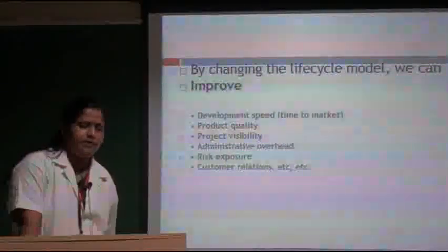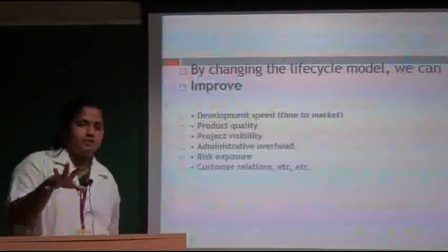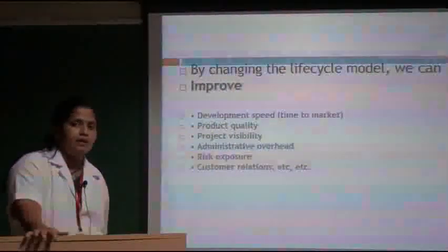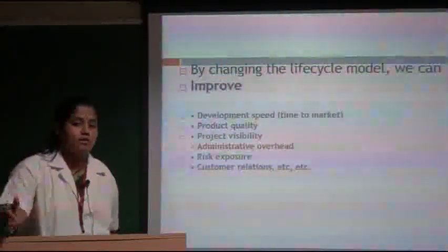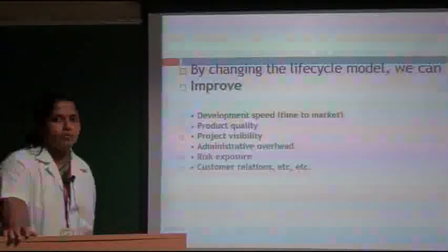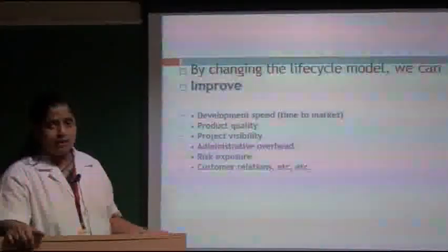When you choose a model for a particular project, if your requirements are stable and will not change, then you can go for the life cycle model. If the requirements keep on changing, then you can go for the prototype model. Based on whether it is a software project, hardware project or embedded system project, we need to select a certain life cycle.